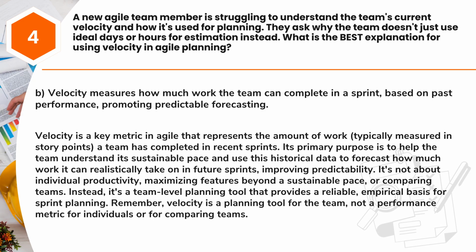Its primary purpose is to help the team understand its sustainable pace and use this historical data to forecast how much work it can realistically take on in future sprints, improving predictability. It's not about individual productivity, maximizing features beyond a sustainable pace, or comparing teams. Instead, it's a team-level planning tool that provides a reliable, empirical basis for sprint planning. Remember, velocity is a planning tool for the team, not a performance metric for individuals or for comparing teams.